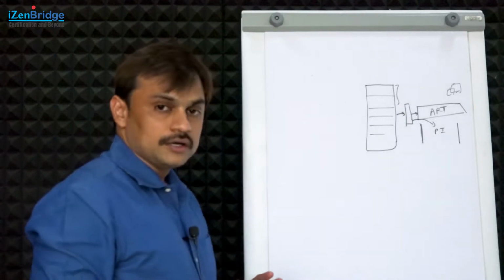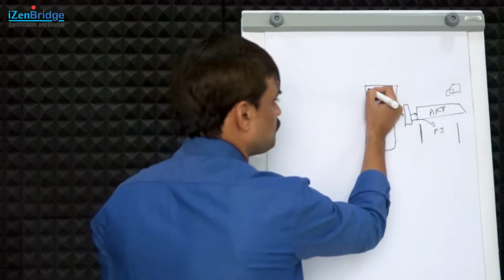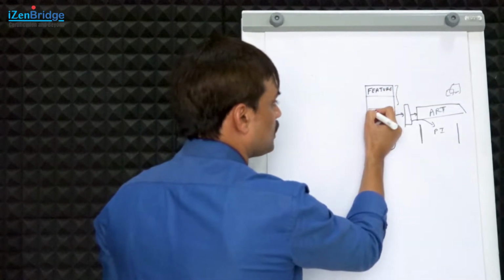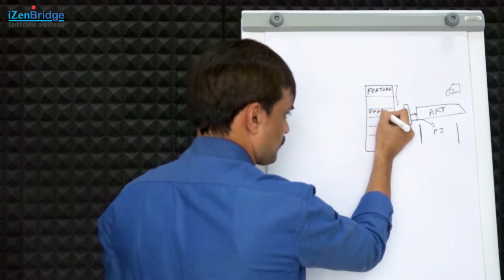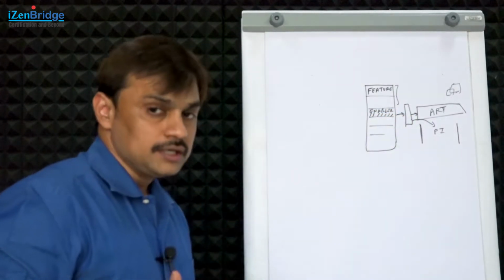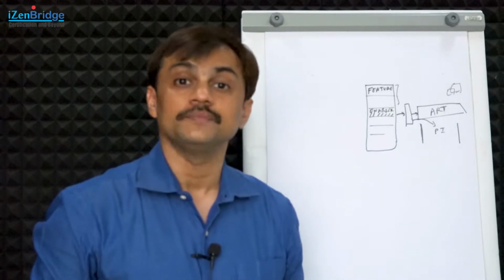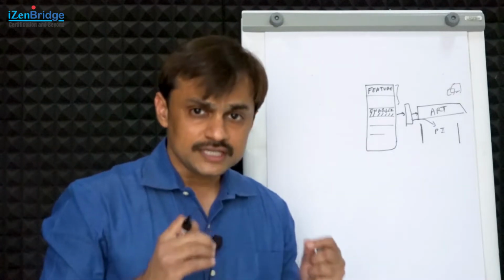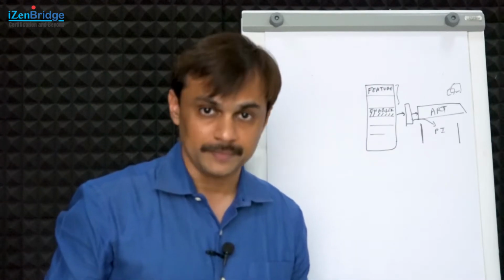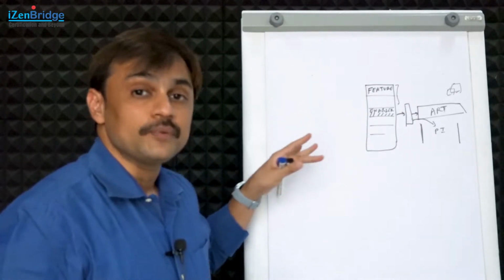The program backlog can have two types of work item. One type of work item is called a feature, and another type of work item is called an enabler. As we have learned in the agile release train roles, the product management is expected to work with business owners and stakeholders to discover what kind of business features need to be developed in upcoming time. Those things are coming as a feature in the program backlog.